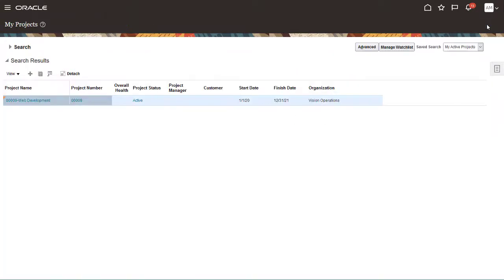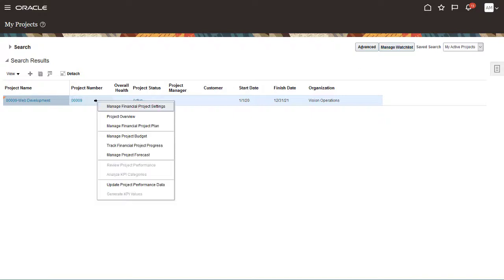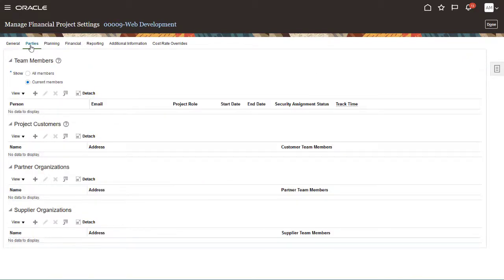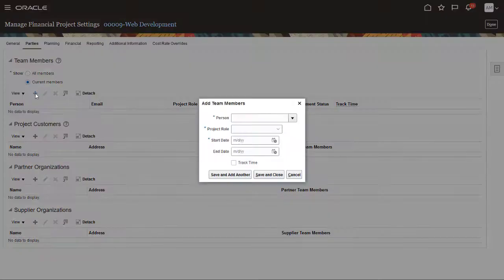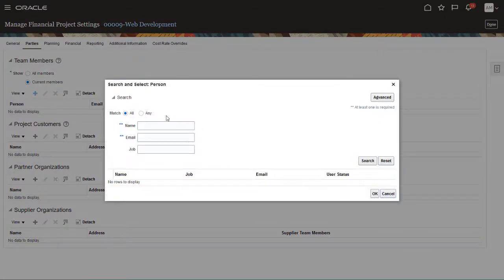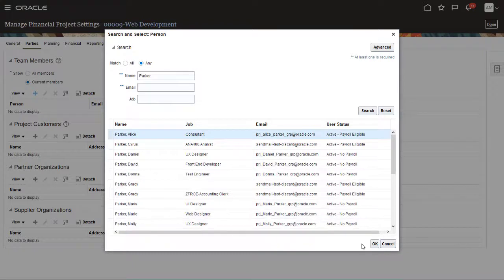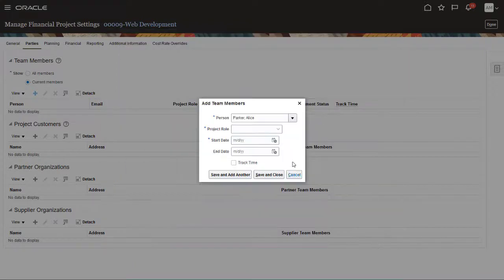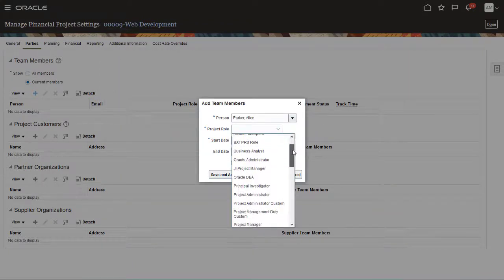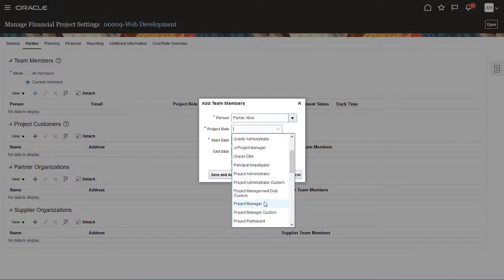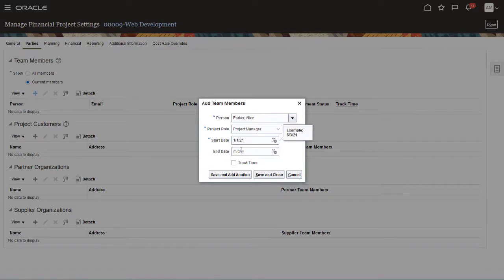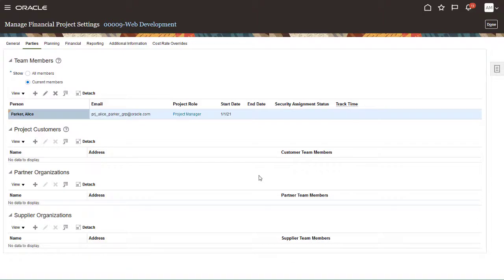Next, assign a project manager, a user who enters project budgets and monitors its progress. Right-click in the project row and select Manage Financial Project Settings. On the Parties tab, under Team Members, click Add. I'll add a team member and select the role of Project Manager. I'll specify a start date, but leave the end date open. When you're done, click Save and Close.